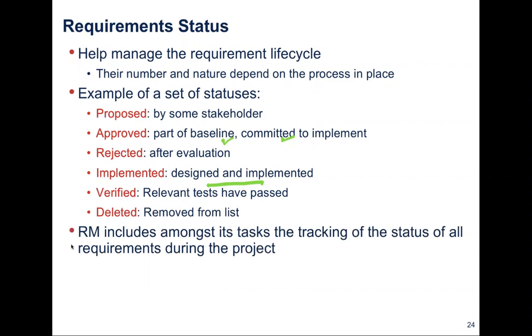So monitoring such a status will help on identifying actions based on the change of requirements. So you might have a rejected requirement, and then the next status for the requirement could be deleted. Or you might have a proposed requirement by stakeholders, and the next status for the requirement could be approved. So monitoring the status of such requirements will help for sure to identify the actions over each change in the requirements and how we're going to control this.